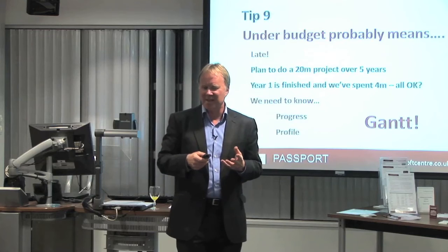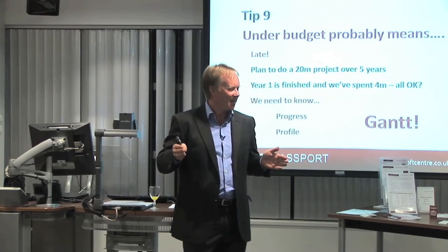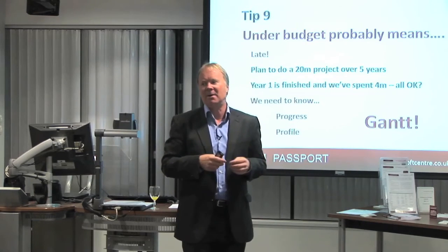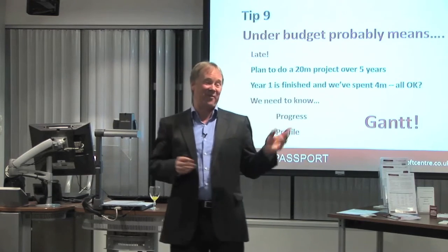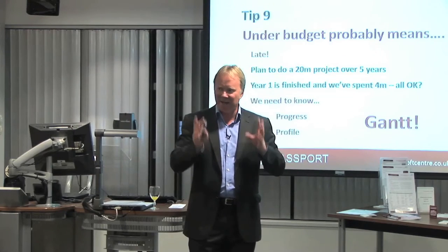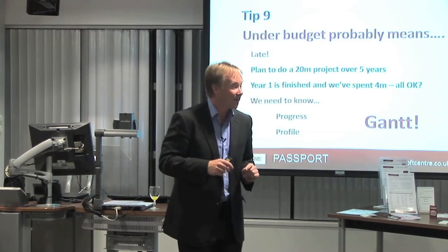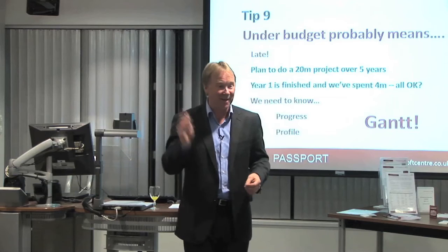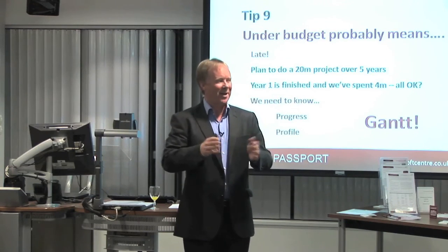So I said, well what do you do at that meeting? What do you talk about if you don't have a half-coloured-in Gantt chart? And he said, good question — basically they tell me stories. They say, oh it's been a terrible month, we couldn't get the concrete to harden off, but we used a different mixture and Fred worked overtime. They just tell him stuff, which is all very jolly, but he has no real picture of what's happening. He could drive out there and look, but what will he find? Loads of holes in the ground, concrete, lorries, men running around — it doesn't tell you anything. The Gantt chart's the only thing that actually tells you what should you have done, what have you actually done.